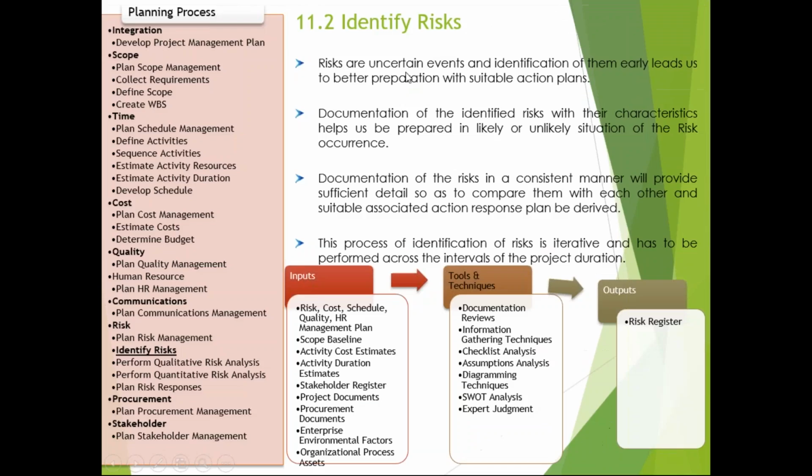So once the risk plan is prepared and signed, I need to go and identify the risks. How can I identify the risk? I can look at the documentation, first of all the previous lessons learned document. I can also look at the contract. If you complete your project within 1 year, you're going to get a 10% incentive, a positive risk. If you are delayed by more than 1 year, there will be a 10% penalty, a negative risk, right? So that is documentation review.